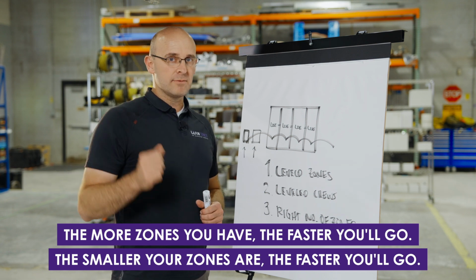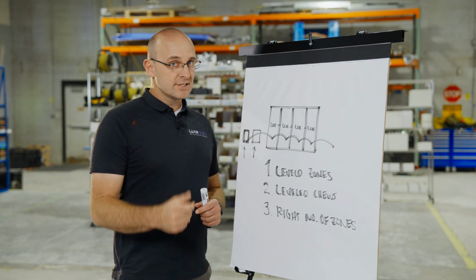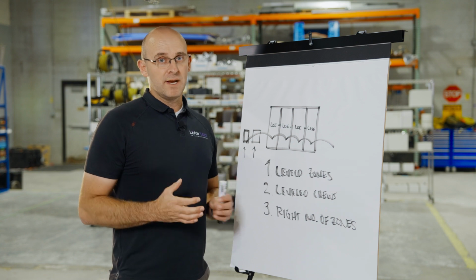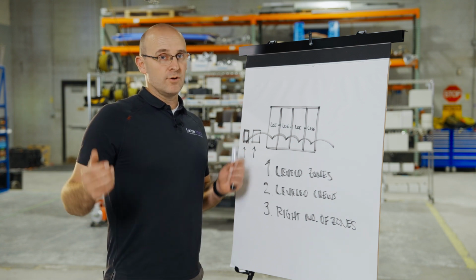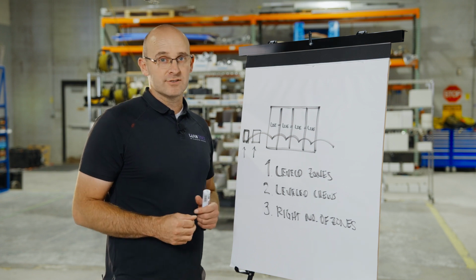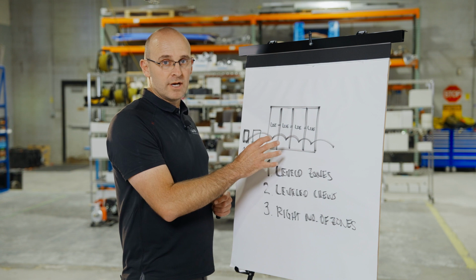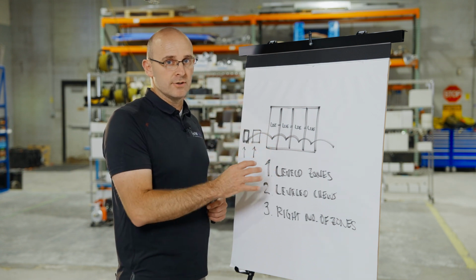That is a mathematical law. And so yes, you have greenies, yes, you have duct, yes, you have gang boxes, yes, you have a minimal space that you can work in. So we're not going to get too small, but we definitely don't want 10,000, 12,000, 15,000 square foot areas. So having the right zone size and the right zone count on your building is crucial.